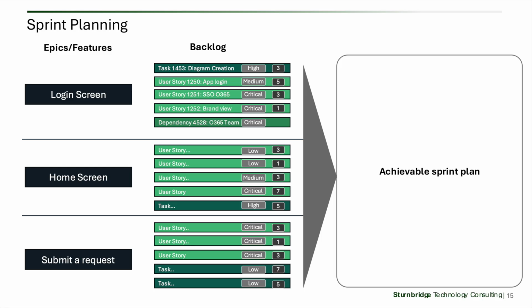One of the biggest planning mistakes teams make is overcommitting. This usually happens for one of two reasons. Either the team tries to satisfy every high priority request, or the team bases the sprint plan on ideal productivity rather than actual availability. Both approaches create unstable sprints.